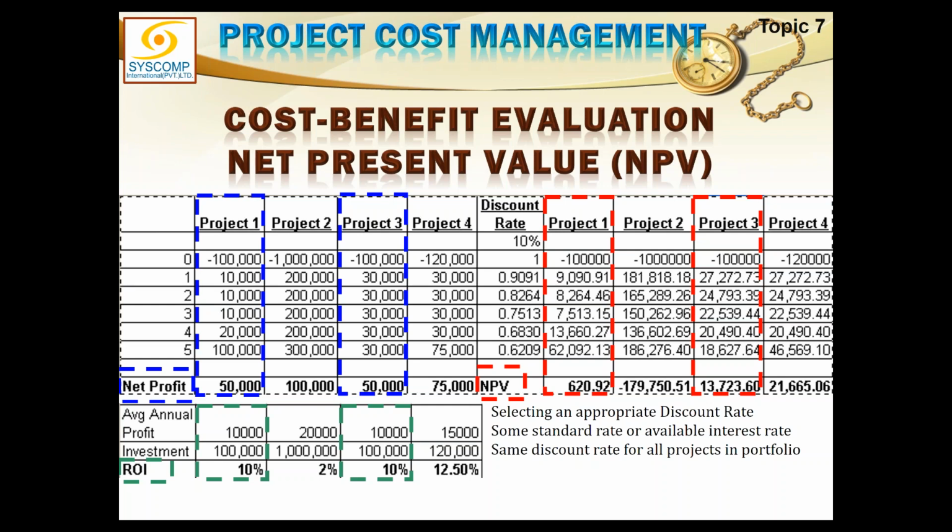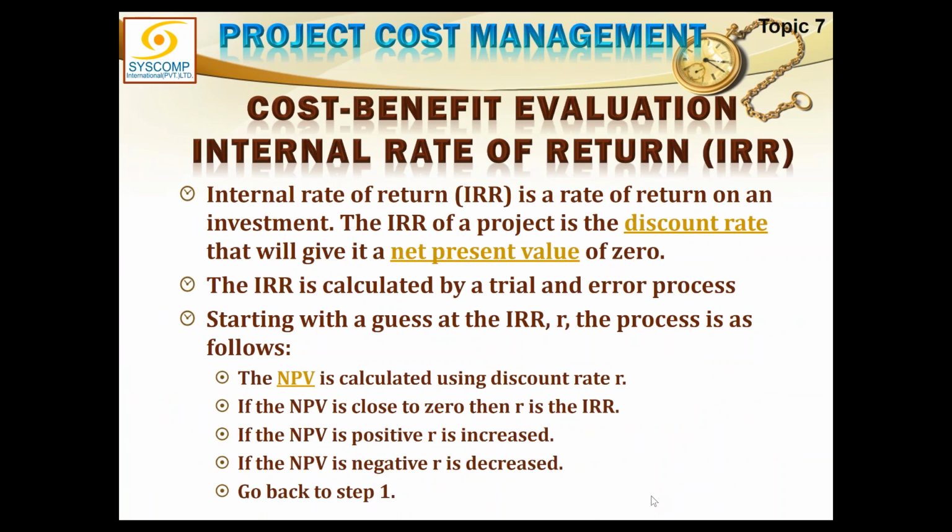Internal rate of return is the best method, and to calculate it is a little cumbersome, a little difficult, but it is calculated by guessing a percentage at which NPV will become zero. So I try different percentages. I try 5%, 20%, 10%, 7%, and I keep closing in near to zero. A good method of doing all this is, I'll show you.